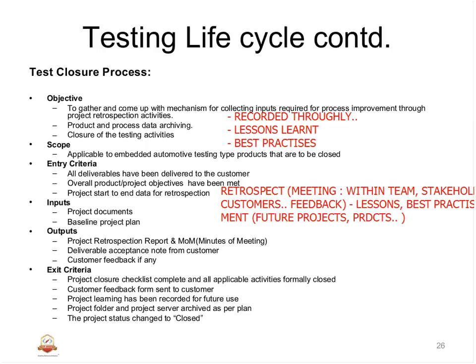You all know that we have to record the minutes of what is done in the meeting. That minutes will identify the discussion summary, any actions required, and anything that we want to highlight. All this will be part of the outputs, and of course as part of the output of this closure we will definitely have to have feedback or acceptance from the user or the customer.